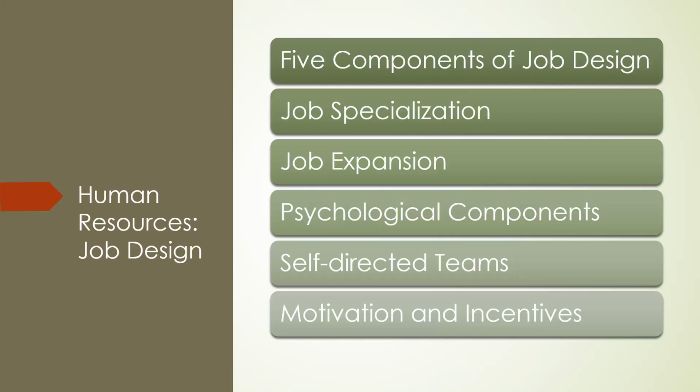Say you're on a site clearing project, and it includes loaders, or front-end loaders, excavators, and dump trucks, and it takes a crew of operators working together to get this done. If the crew members are trained on just one piece of equipment, then there will be delays when one of those members is absent, for a family emergency or illness or whatever the case is. So if you only have one driver for a dump truck and that driver's out, then you have no one to cover down. So that's going to cause delays in the process.